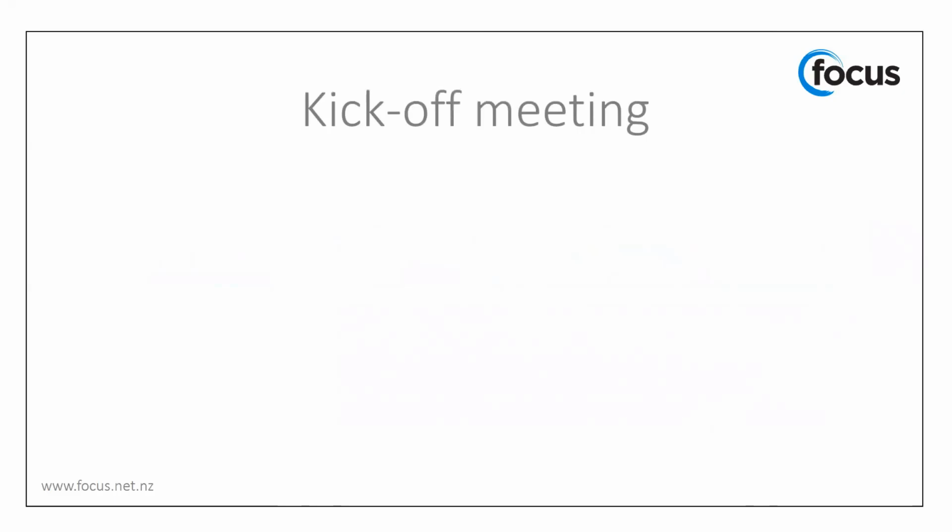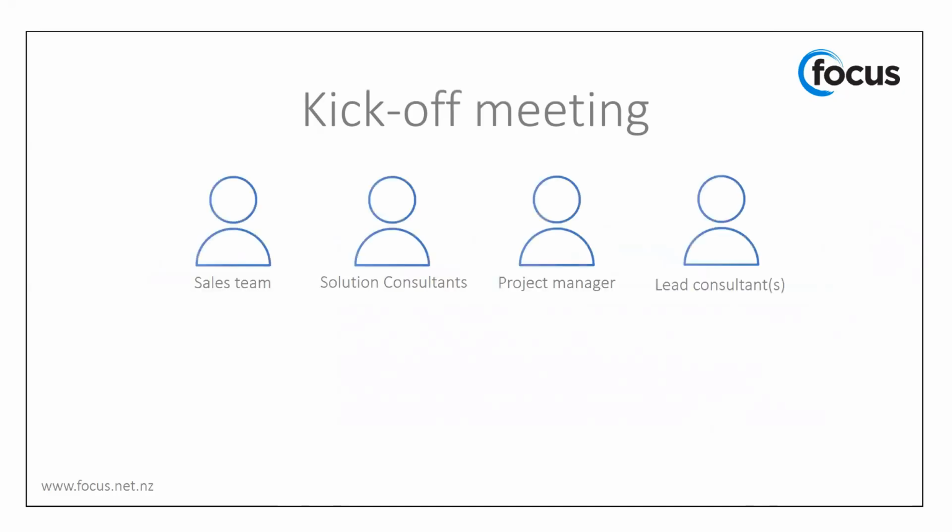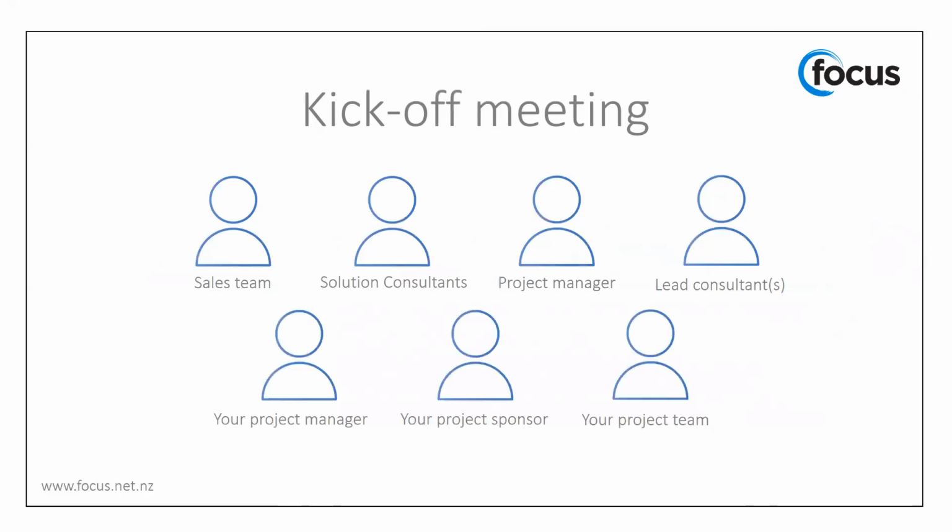Sure. So the kickoff meeting is the formal handover from the sales team to the projects team, where the sales team outline the client's requirements of what has been discussed in the sales process. In terms of who is involved in this meeting, from the partner side, it would be the salesperson and the person or the people who did the demo, as well as the project manager and the lead consultants who will be carrying out the implementation. From the client side, it needs to be the project sponsor and the manager and any other key staff that you feel may be required.